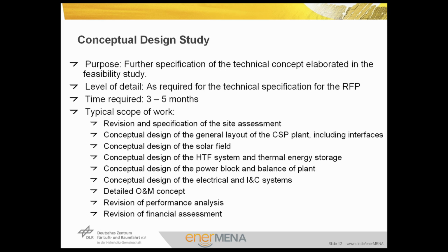So the purpose of the conceptual design study is to give further specification of the technical concept elaborated in the feasibility study to have the level of details as required for the technical specifications of the request for proposal documentation, or RFP. The time duration required is normally 3 to 5 months, depending on the level and also the maturity